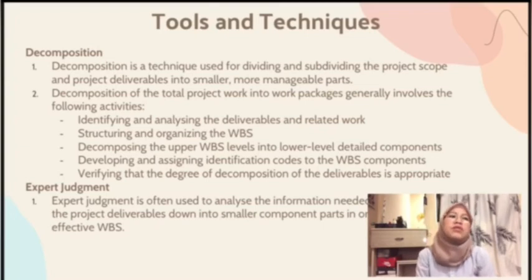However, excessive decomposition can lead to non-productive management effort, inefficient use of resources, decreased efficiency in performing the work, and difficulty aggregating data over different levels of the WBS.